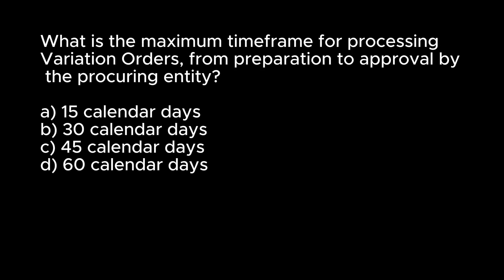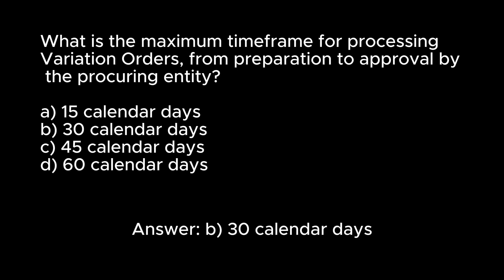What is the maximum time frame for processing variation orders, from preparation to approval by the procuring entity? A. 15 calendar days. B. 30 calendar days. C. 45 calendar days. D. 60 calendar days. Answer: B. 30 calendar days.